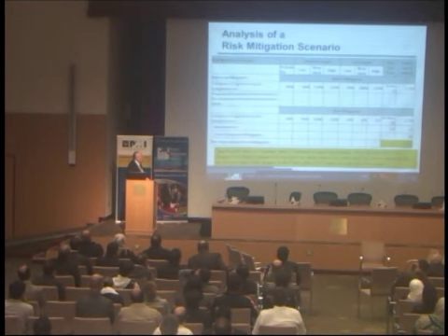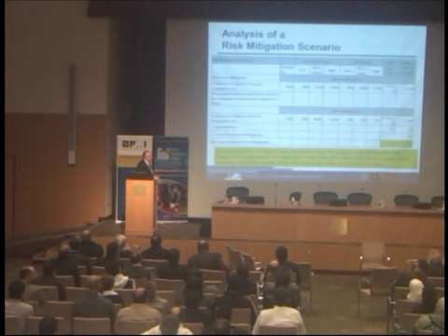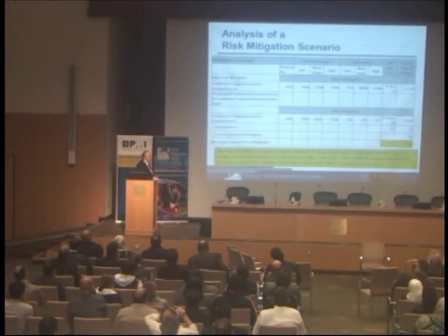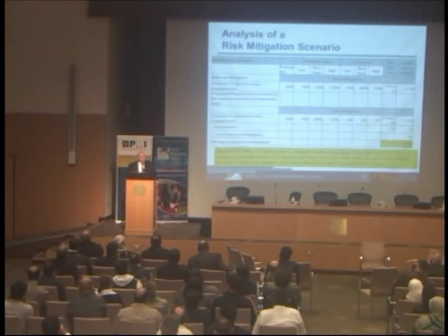This cost risk range actually increases because the cost estimates of this could be too low. Well, if you do that, you're not mitigating this risk 100%, but you are making it go from January 6th to November 14th, and so you're saving 53 days. Interestingly, you're saving $24 million of the cost contingency reserve because some of that was held for the schedule risk that was caused by this risk.